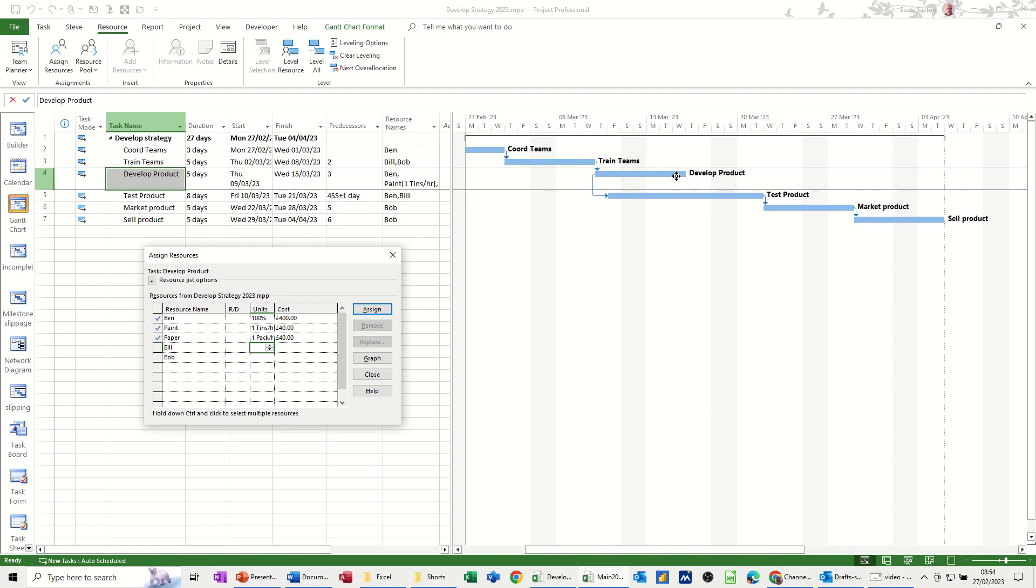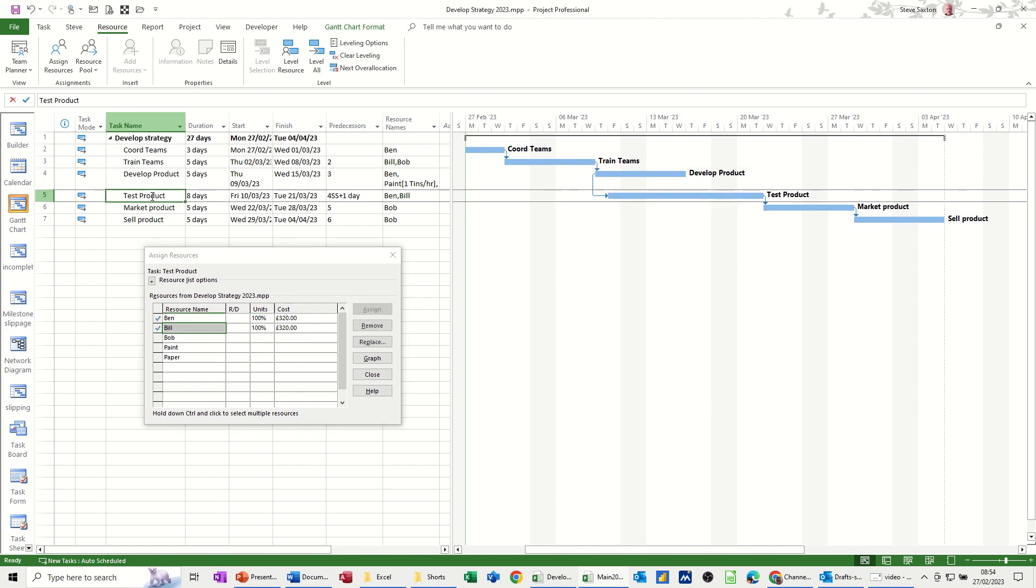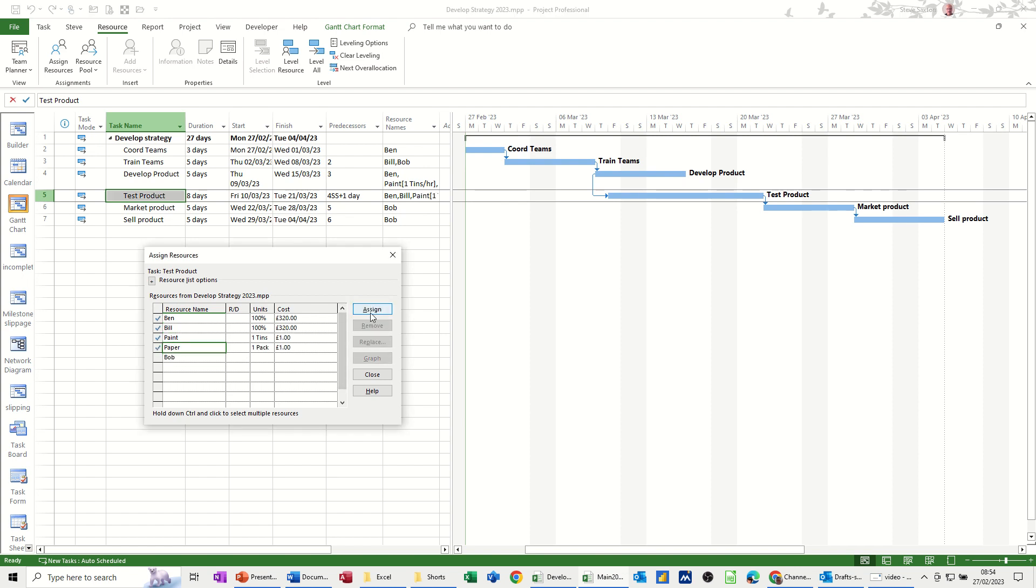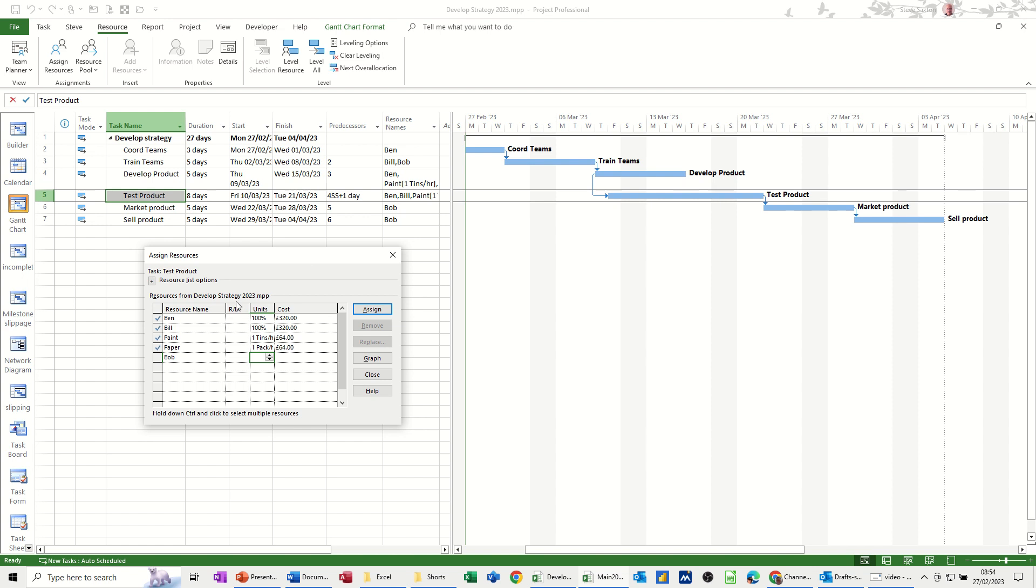If I do the same again for test product. I'll assign paint and paper. And then do the same thing. One per hour. So that'll go to £8 a day. And that's a total for all that duration. That's eight days. 8.8 so 64 by my reckoning. One per hour. Again. And then that should change over to 64 as well.